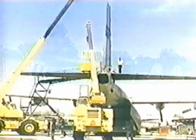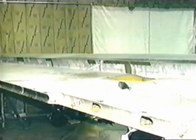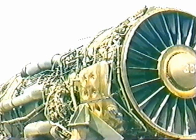The tarmac at the old museum soon looked like a scaled-down version of the boneyard at Davis-Monthan. Although parts ranging in size from wing panels to entire tail sections were carefully stored on site, very few were considered spare. Each part, each section, each engine was a part of a carefully thought through master plan. As construction continued, smaller parts were moved to the parking lot at the new location.